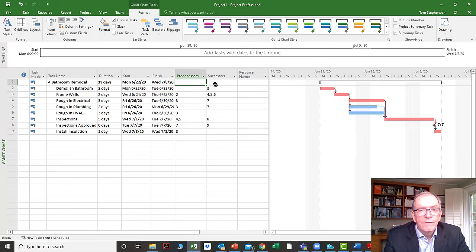The headings, if I've done the headings, like the summary tasks really well, then I shouldn't have anything linked to the summary tasks. We'll talk about that in another tutorial as well. It's best not to link to summary tasks. The program lets you, but it's best practice not to. And I'll stick to what's a best practice in my discussions on tutorials. And I'll tell you also where there's some things that are done that are a little bit more flexible. So I'll tell you good best practices, etc.